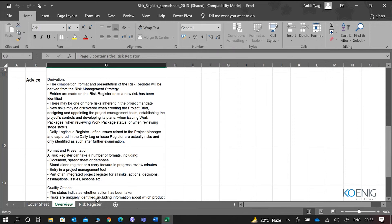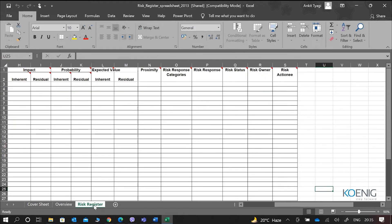Then there is the actual risk register document itself. In this risk register, we usually have the impact of the inherent risk and the impact of the residual risk. Inherent is basically the risk as it is present without any control, and residual is the remaining risk after we have implemented the controls. So what is the impact before and after is what inherent and residual is about.